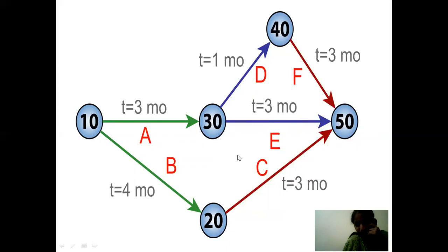Next one, see here. The 50th is the last activity, the last task. It will be completed when the 40th as well as the 30th as well as the 20th are completed. So three events are there. These three pre-events should be completed before this 50th task. Then successor means, see here, 10. For example, this is the 10th node, the 10th task.